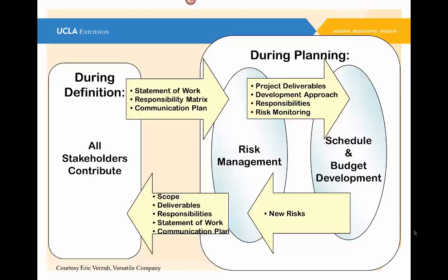And then during the planning cycle, as the planning team, the project manager and several subject matter experts and whoever else may be involved in it, maybe a customer representative, are working on the schedule and budget development or risk management portion of the planning, any one of these places you can identify new risks, and you should be ready to write down the risks. You don't have to evaluate them right then. When you go into the focused activity of risk analysis and risk management and what you're going to do with your risks, that's when you take all these risks and start to work through them.